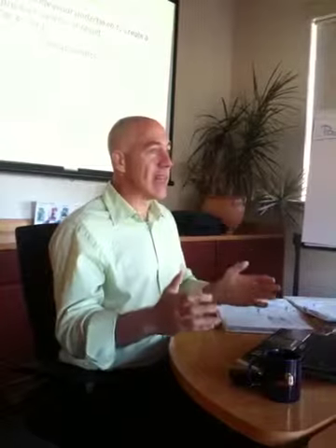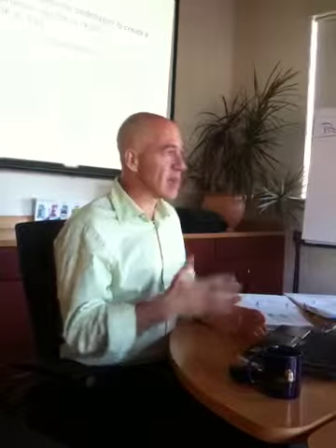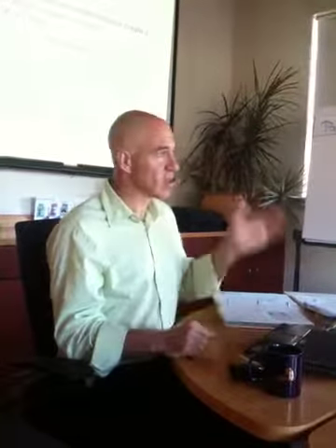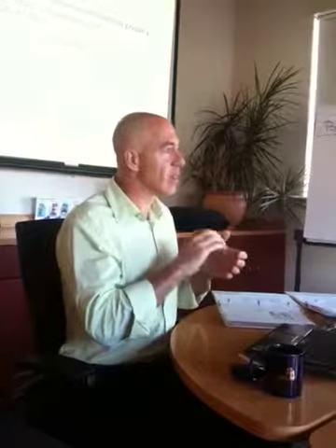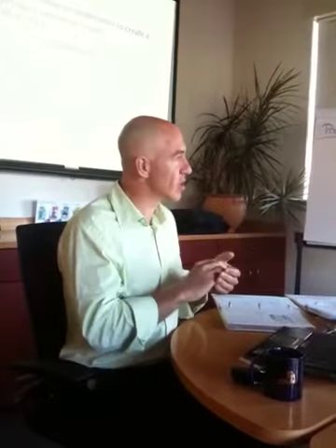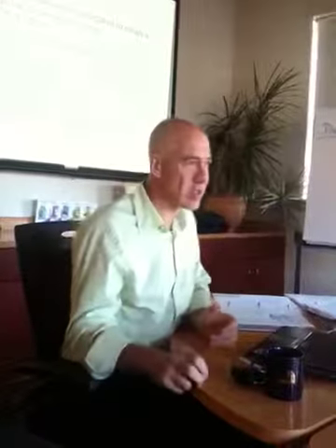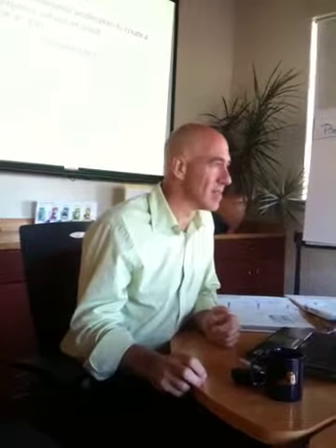So at the end of the 3 months, the 3 months comes and goes, and often what will happen is either the project will drop, like let's say you sold the coffee shop and someone else took it up, the project will just drop and it doesn't have any organizational place to sit. So part of any good project is right at the beginning you want to figure out where is this going to land? Who is going to own this when it's done? Where is it going to be?